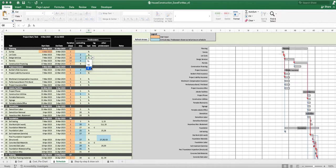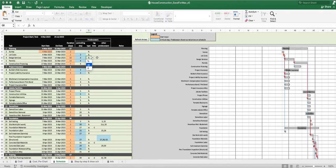You can set relationships as finish-to-start, start-to-start, or finish-to-finish — these are industry terms. Most of the time you'll use finish-to-start, which means, for example, you have to finish the foundation before you can start the framing. A start-to-start relationship might mean you can start nailing the wood framing together when you start the framing phase. Then there's lag time — any days you put in here represent a delay between finishing one step and starting the next.